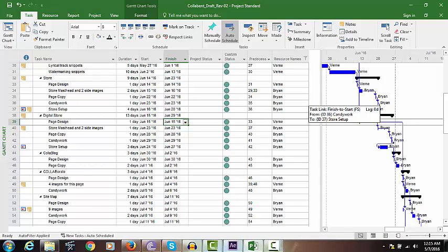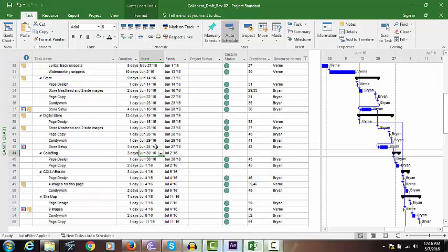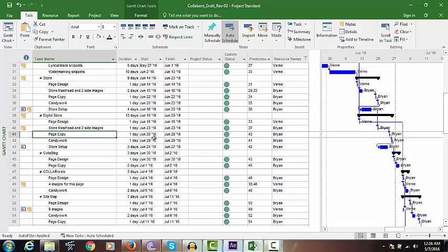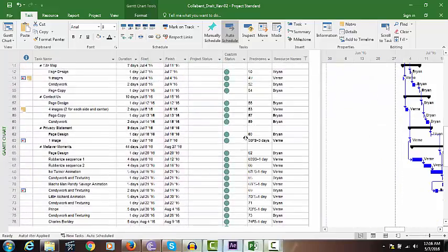It will be like that, but if you realistically want to start by yourself, then for these activities you need not spend 5 hours a day completely. Then there has to be a multi-level, meaning multiple tasks you need to fulfill on the very same day. If you are able to give me the breakup of the activities which you can do, like for instance this page copy, an entire 1 day isn't required, an entire 5 hours may not be required. In that case you can just give me a duration, like an hour, how many hours you will be able to work on these activities. Based on that I will be able to prepare a better schedule.